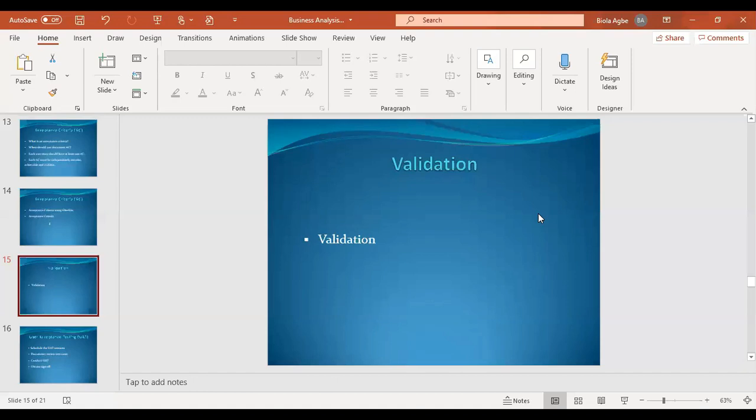Yeah, so that's evidence that you have a sign up before you actually send the document for development. So that's it. Then you'll be able to save that. Once they provide that sign up, you can now save that version as 1.0. So that's your first. Even if they make changes after they've signed up that requirement, and they now say,